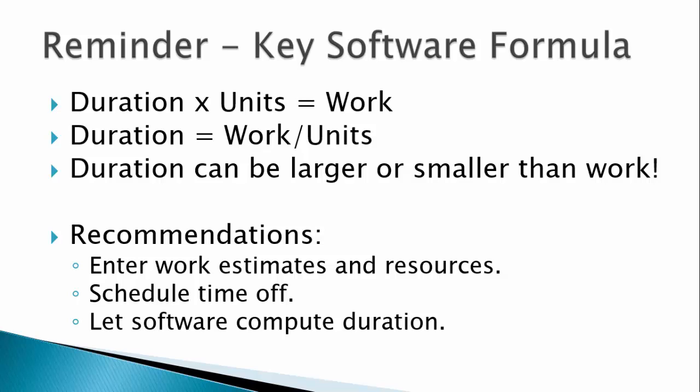You will also be given a chance to let Project know if the cause of the greater duration was because work increased or the resources will work less hours per day on the task. The latter is the default since you've already told Project that we want it to honor the work estimates provided by the team. If we make the duration smaller, Project will update to the smaller duration. Project will be forced to update the work estimate to fit within the smaller time frame. So whenever you make changes to existing tasks, be observant of how the software updates the project so that you remain in control.